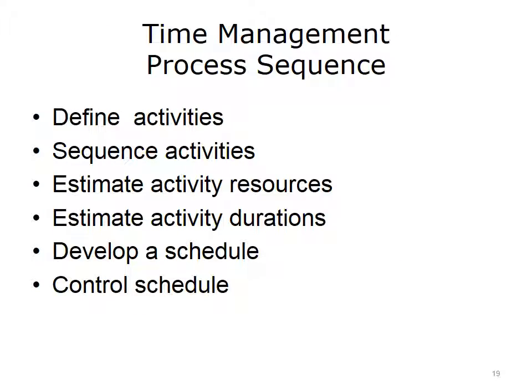During project planning, the project team decomposes the work packages to produce an activity list composed of multiple activities. The activities are sequenced, activity resources and durations are estimated, and a project schedule is developed. A goal of the project team is to develop a realistic schedule. All of the project work that must be accomplished will be included in the schedule.